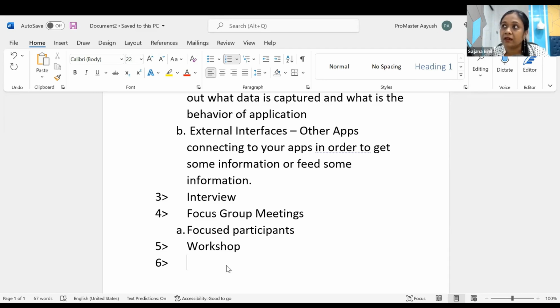When I say that, let me give you a project scenario where we used a workshop. In this particular project, we gathered the requirements. Now, this was a compliance application that we handled for a bank. So here, we gathered requirements using the interview technique. We started with the interview technique. We spoke to some ground level staff, the compliance team that's involved in starting the compliance audits. We involved them in an interview discussion, 4 to 5 people in a discussion, and got the high level requirements from them.